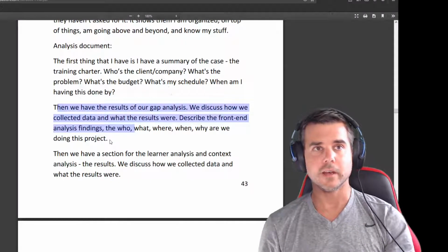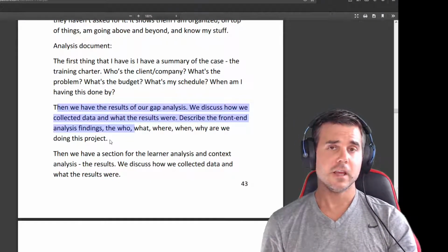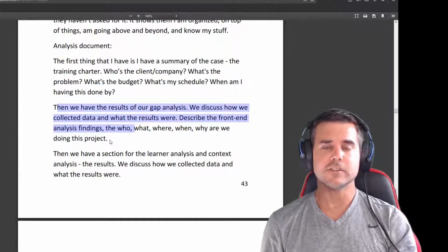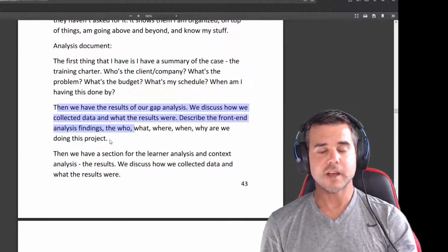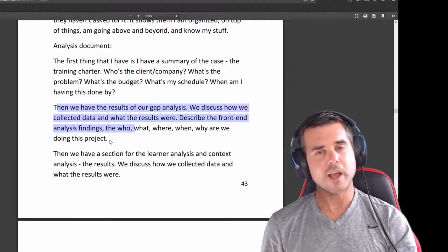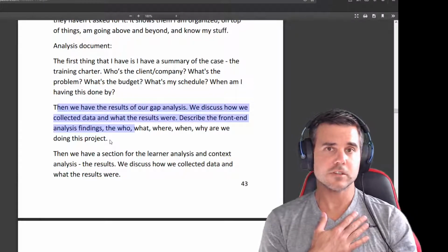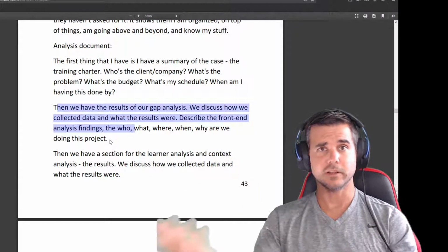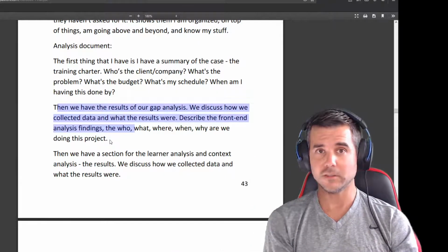And I give an explanation, like, do you want narration? Do you want video? Some people ask, why does narration cost $500 an hour? Well, it's not that it costs that; it actually costs about $500 for 20 minutes. Why does narration cost that much? Because I'm not doing the narration myself. I'm hiring a person who has a professional recording studio with a professional-level microphone.